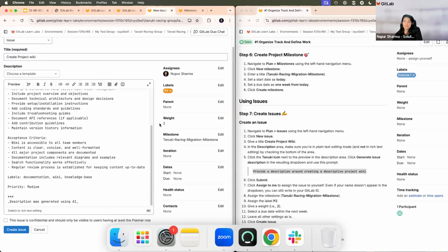And also, usually, teams have a specific number in a sprint. So, for example, you can say in a sprint, we can usually take 20 weights based upon the number of developers we have and the amount of hours we work. That gives you a roundabout aspect of how much you want to take in the sprint or how much you want to remove from the sprint and so on.